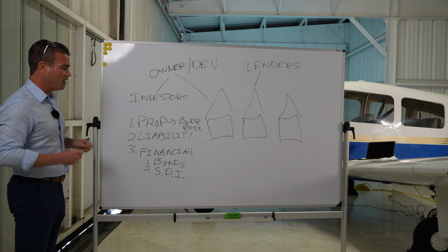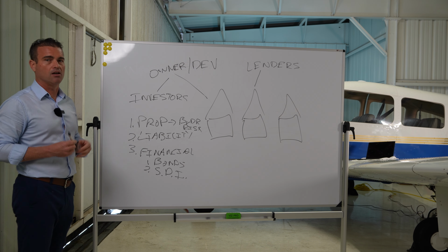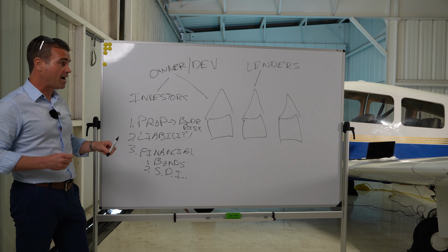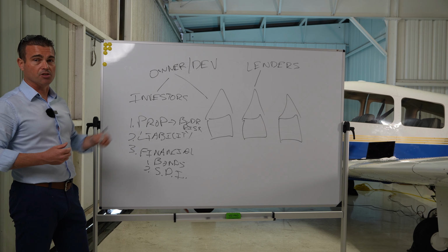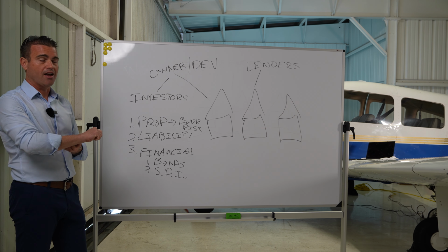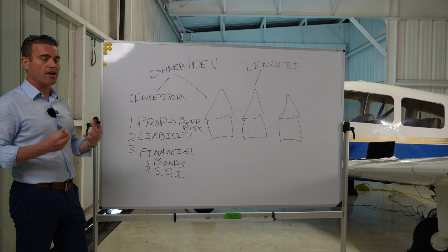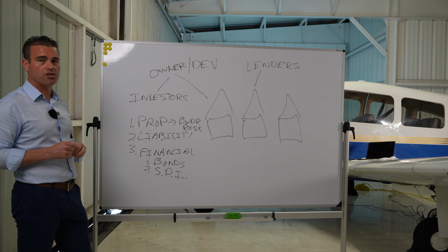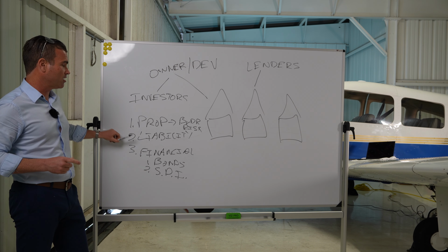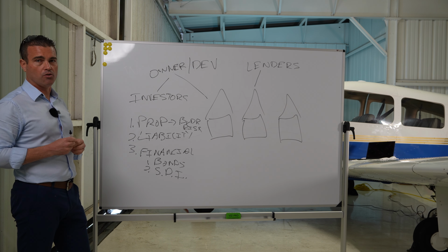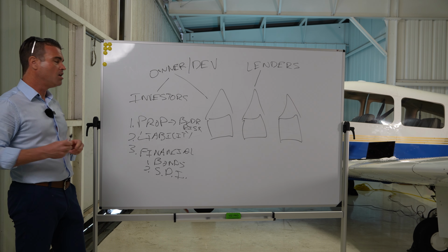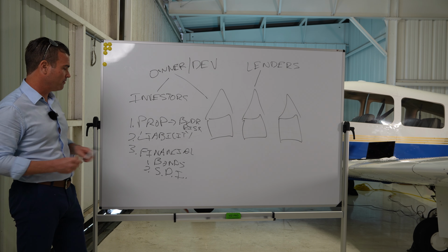And something else we do on that note is if we are dependent on the subcontractors, we'll implement something called vendor insurance tracking. To where we'll implement a system to track that subcontractor's insurance, and prior to any draw requests or any payment made, along with the lien releases, we make sure that they're providing proof of coverage, and essentially based on their retainage, and even looking forward 12 to 24 months at the project end, we still want to make sure they have proper coverage. So those are some of the services that we provide and offer too.